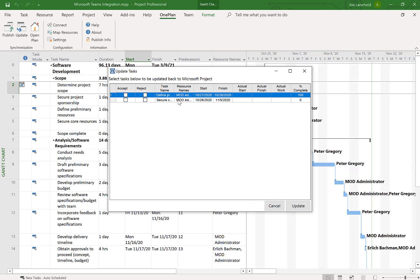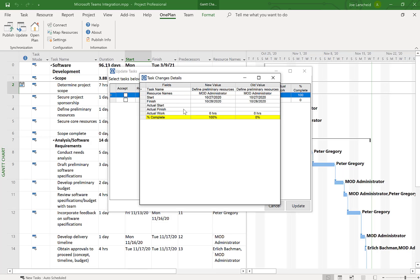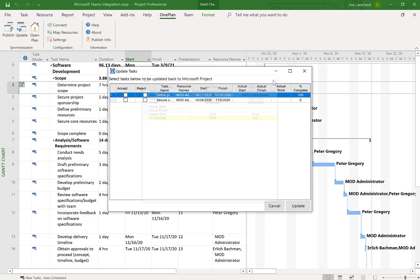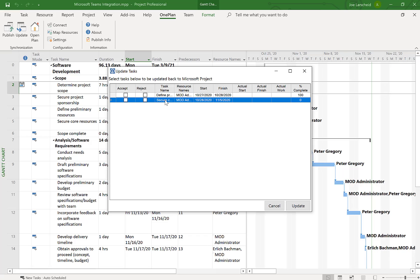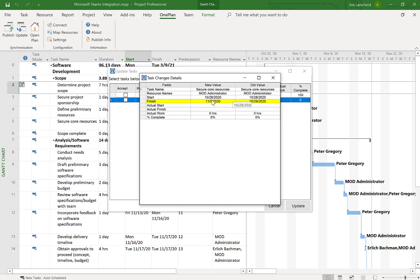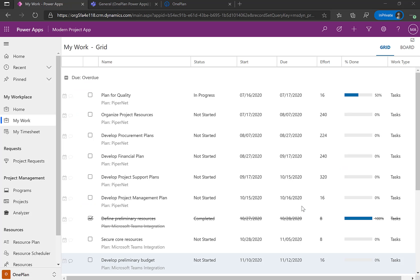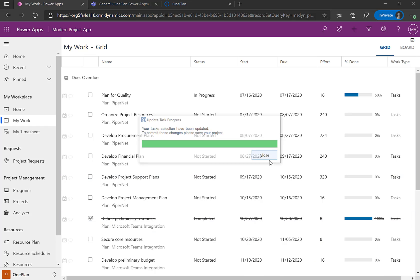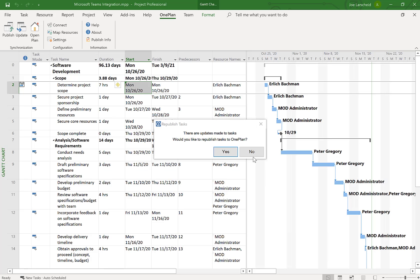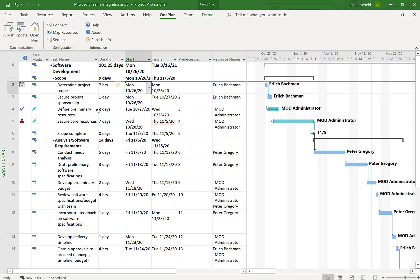Now I have two updates being reported back to the project manager within Microsoft Project Desktop. I can click each update to see what changed — the 'define preliminary resources' task went from zero to 100%, and the date for the other task was changed from the 29th to the fifth. I can accept these changes, and now this task is 100% complete and this task has moved out to November 5th.